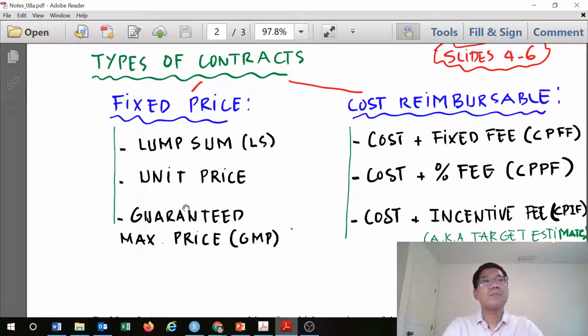Normally a public institution like FGCU has a budget allocated for a certain project, and if the actual cost is more than the budget, it's hard for the institution to get the money somewhere to pay for the extra. So before they start the project, they need a guarantee from the contractor of the maximum amount it can cost, and that is called the guaranteed maximum price.